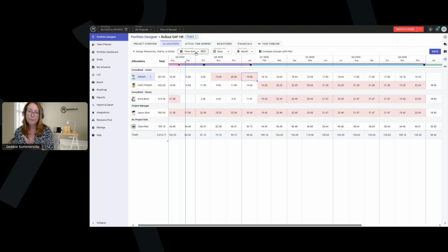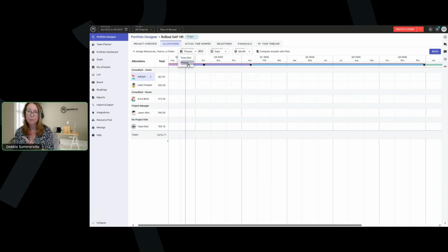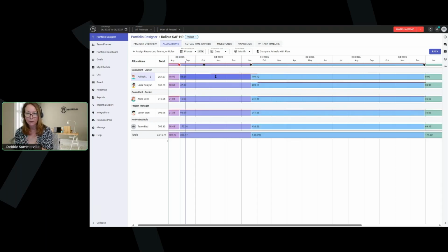What the phase mode does is technically add up all of these times and puts it into a time slice, 58 days. Now, if I move this milestone where it's going to end later, it still keeps 58 days as the effort, but notice the duration of that milestone has changed.